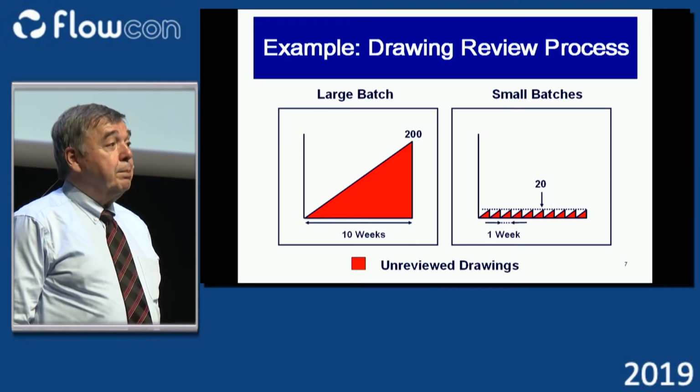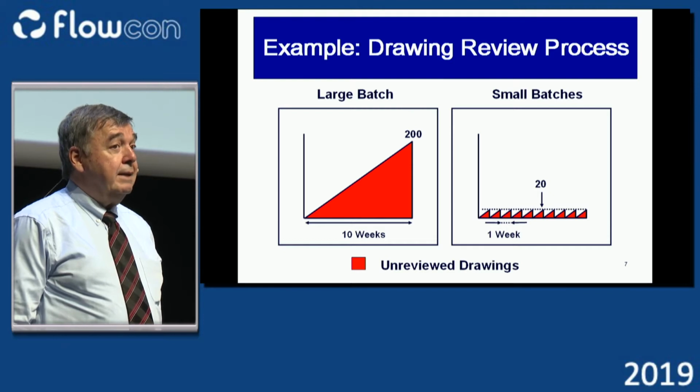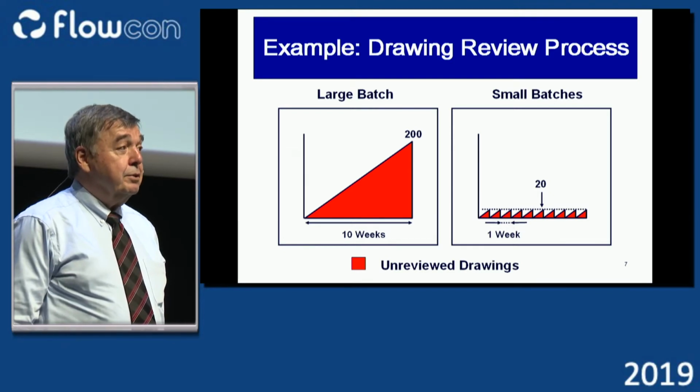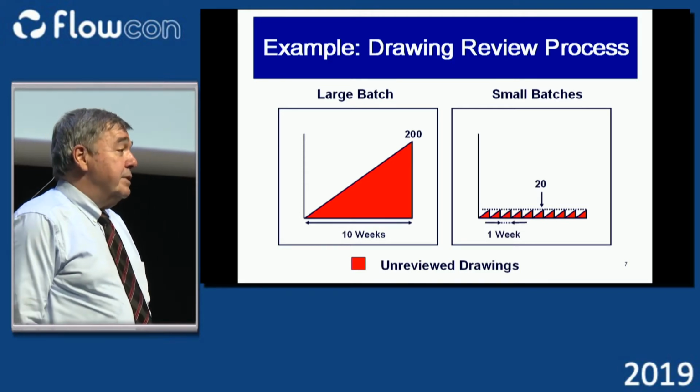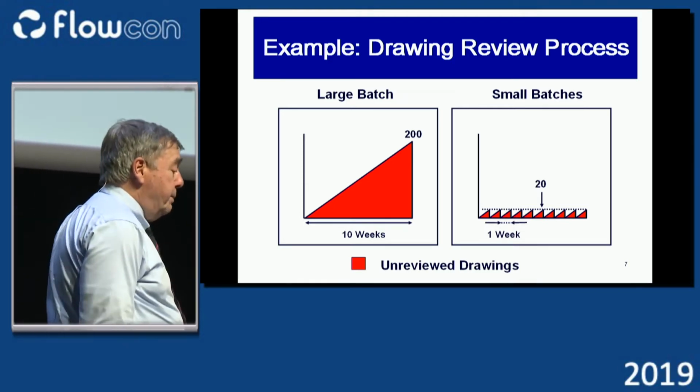They have an opportunity to embed that bad assumption in another 200 drawings. And again, we've learned that lesson in software. A programmer makes a bad assumption about a protocol, you give them feedback 24 hours later, they stop embedding the bad assumption in the work they're doing. Other people stop designing stuff that is dependent on it.